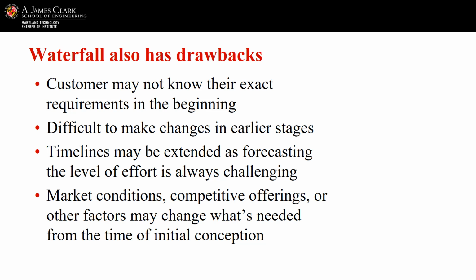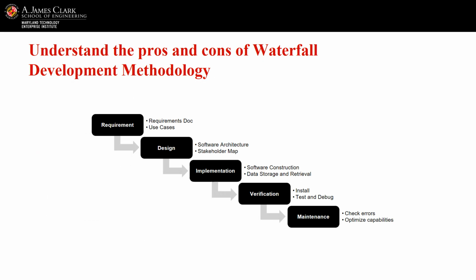Lastly, for example, maybe you thought customers wanted a certain product, but after building it, you discovered the market conditions changed and they no longer wanted it. If you're working on a product where the requirements and technologies are well known, Waterfall is a reasonable approach.